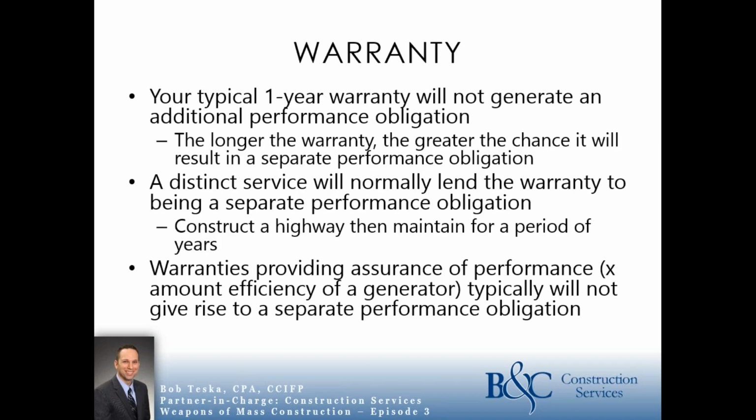A warranty. So this is interesting. Your typical one-year warranty for workmanship is really not going to rise to the level of a separate performance obligation. However, the longer the warranty, the greater the chance that you're going to have to break off a piece of the contract and show it as a separate performance obligation. A distinct service will normally lend the warranty to being a separate performance obligation.